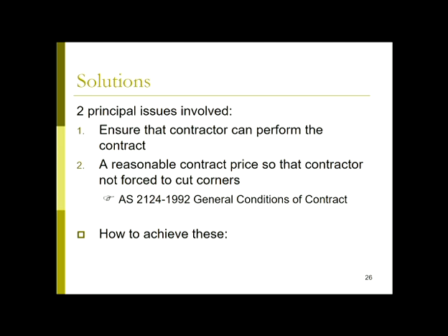And you guessed it, there's an Australian standard to help you. This is one of the guiding standards, general conditions of contracts, that help with things like what's a fair level of remuneration, what's a fair payment schedule, and all the other things that might be associated with managing the cost within a contract.